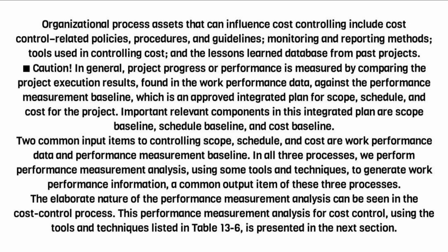Caution. In general, project progress or performance is measured by comparing the project execution results, found in the work performance data, against the performance measurement baseline, which is an approved integrated plan for scope, schedule, and cost for the project. Important relevant components in this integrated plan are scope baseline, schedule baseline, and cost baseline.